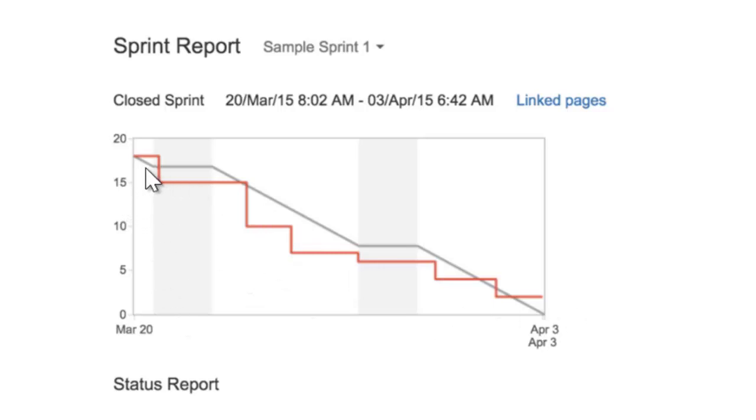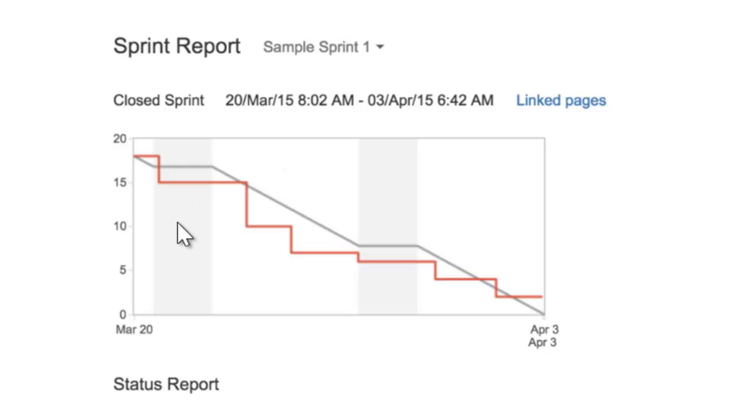Let me tell you what is the meaning of the red line, gray line, and these boxes. If I talk about the red line, it tells us about the actual progress of the sprint and represents how many issues are remaining in the sprint. This line also reflects if issues are being added or removed from the sprint. The gray line is an ideal one, which shows linear progression from the beginning to the end of the sprint. This gray line is drawn from the total estimation of the issues at the start of the sprint. The gray line stays flat during the non-working days, and this gray space represents the non-working days.